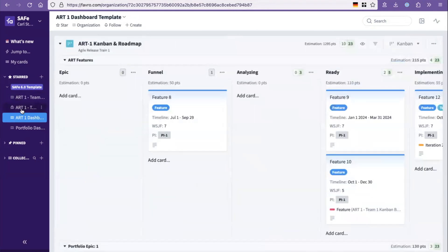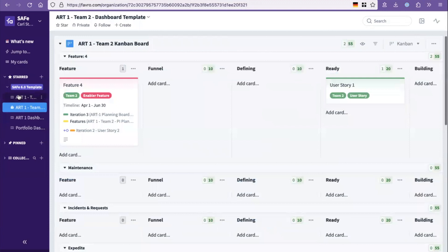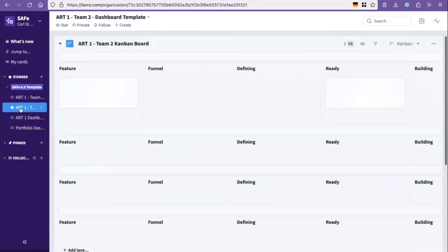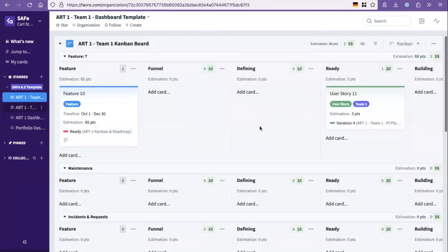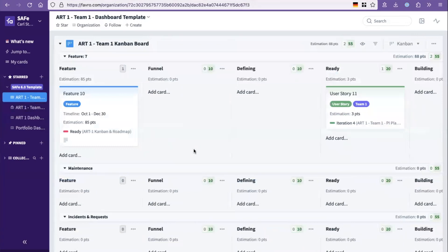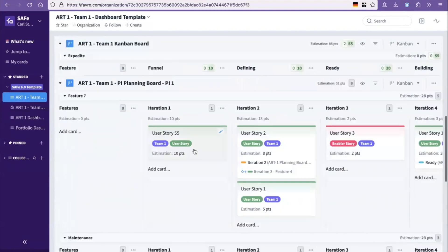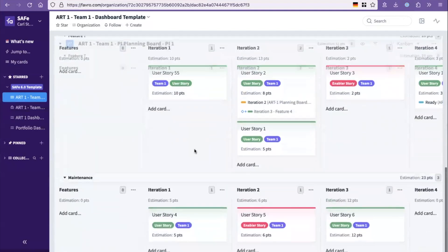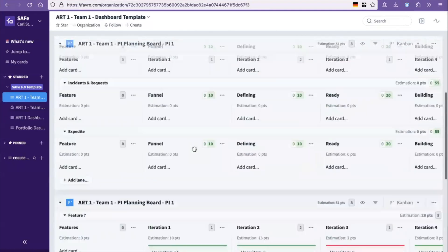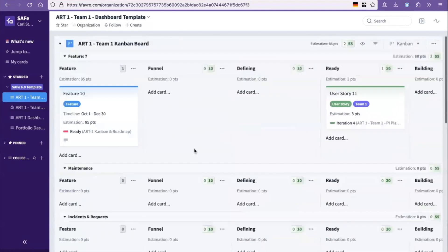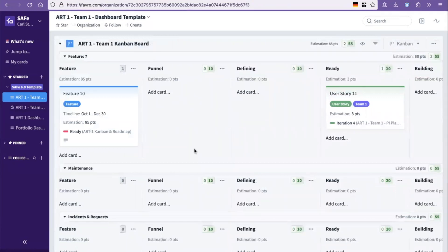And then it has a template for teams, team one and two, that can build out their own team area where they work with a combination of an iterative method or a flow method and then break down the work in the features and epics to work items that they actually do. So there's both a PI planning board in there and a Kanban board for the user stories that they build. So that's the basic outline of the template.